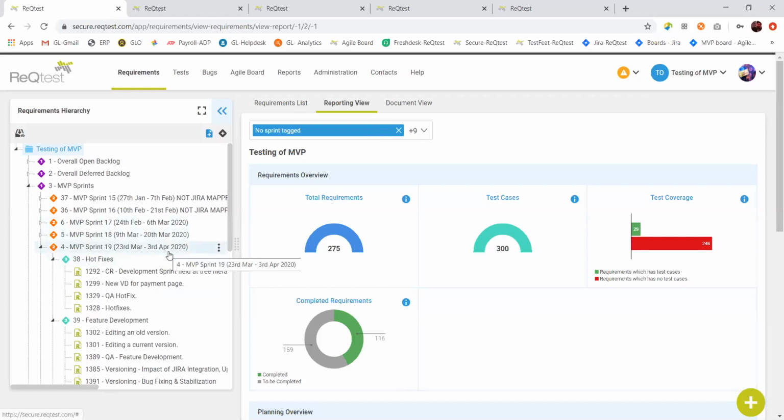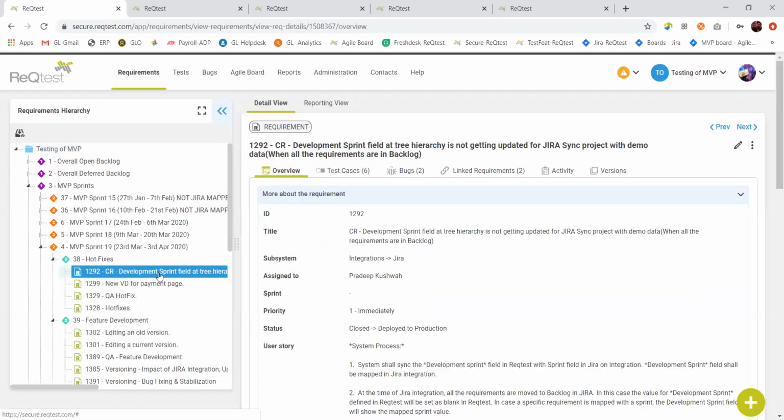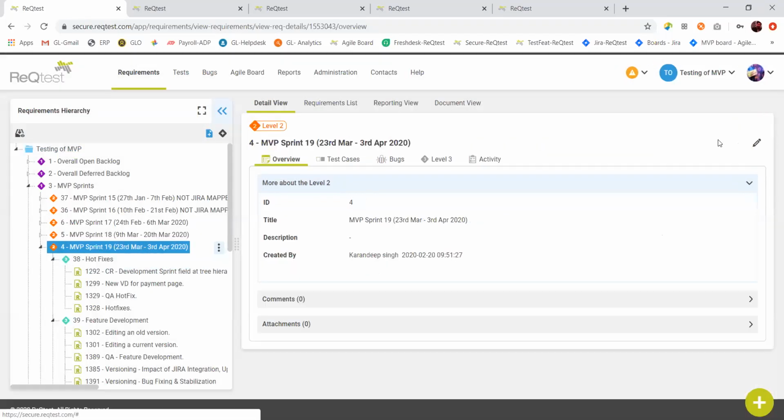We do two-weekly sprints. We have a fixed scrum team size, which is developing some features. We are agreeing with the customer on the development hours that we spend, per resource per day. And we are also estimating the overall hours spent by our team on any particular track.